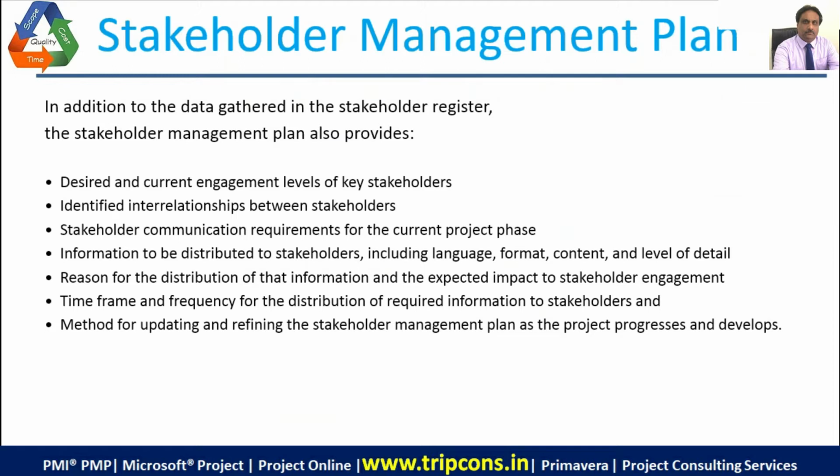And the reason for the distribution of that information and the expected impact to stakeholder engagement, time frame and frequency for distribution of required information to stakeholders, and method for updating and refining the stakeholder management plan as the project progresses and develops. So that is the stakeholder management plan.